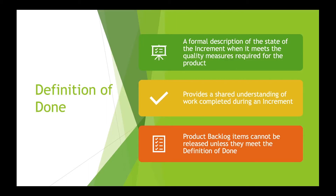Done-ness is a critical component of the Scrum framework in that the ultimate goal is to frequently deliver value to the customer. In order to represent delivered value, functionality must be completely done. The Scrum framework requires a formal definition of done describing the state of a sprint backlog item when it meets the required quality measures. The definition of done communicates a shared understanding of when a sprint backlog item is complete. A sprint backlog item cannot be presented at the sprint review or included in a release until it meets the definition of done.